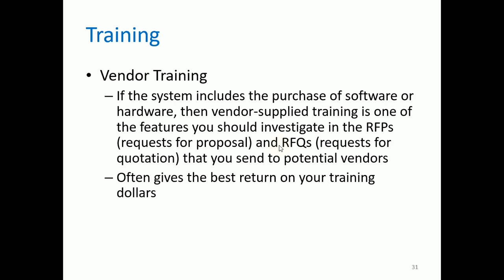Okay, so let's continue with the vendor training. If the system includes the purchase of software or hardware, then vendor-supplied training is one of the features you should investigate in the RFPs, or requests for proposal, and RFQs, or requests for quotation, that you send to potential vendors. If you're going to acquire hardware or software from a vendor, you have to make sure that training is bundled with what you're going to pay. It often gives the best return on your training dollars because the vendor training is already included in what you pay when acquiring the software or hardware.